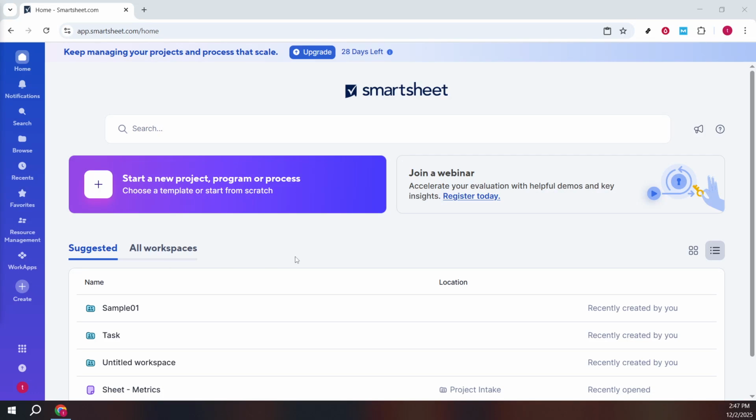In today's video, I'm going to teach you how to create milestones in a Gantt chart in Smartsheet. A milestone is a zero-duration task that marks a key point in your schedule, like a kickoff, an approval, or a launch. In a Gantt chart, it appears as a diamond so it stands out from regular tasks. Let's walk through creating one from a clean starting point so you can use this in any project.